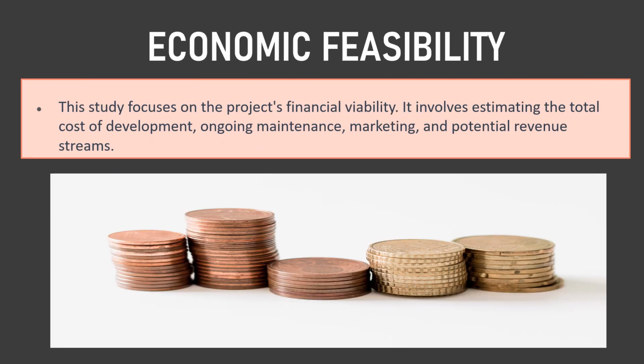What is economic feasibility? This study focuses on the project's financial viability. It involves estimating the total cost of the development, ongoing maintenance, marketing, and potential revenue streams. The team considers the projected return on investment (ROI) and whether the app is financially viable in the long run.